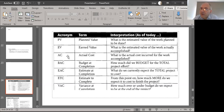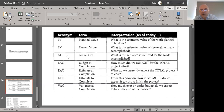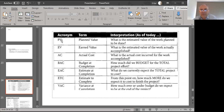To continue the example: if I go out for dinner, get a beautiful dinner worth more than 2,000, but due to a promotion the bill is only 1,500 — then my actual cost (AC) is 1,500, my planned value (PV) was 2,000, and my earned value (EV) is still 2,000. So PV is how much you plan to get done, EV is how much value you earn when that work is actually completed, and AC is the cost incurred for doing that particular work.